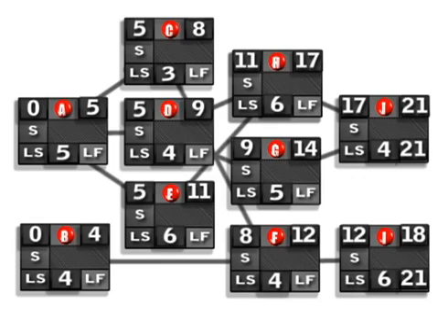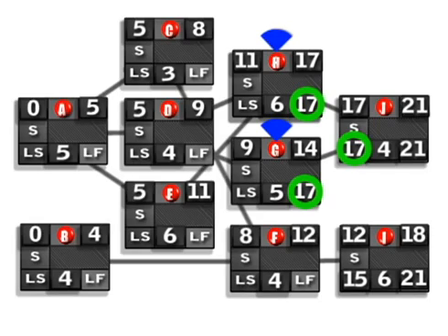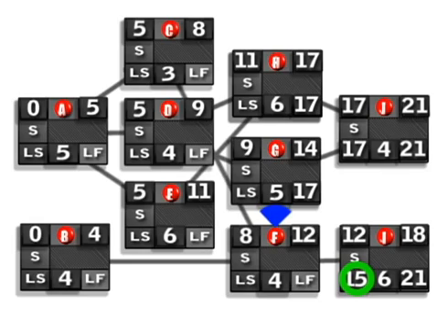So now we're going to calculate the late start for activity J. 21 minus 4 is 17. For I, 21 minus 6 is 15. So we're going to take 17 and we're going to transfer that into activity H and G as the late finish. And we're going to transfer 15 for activity F as the late finish.